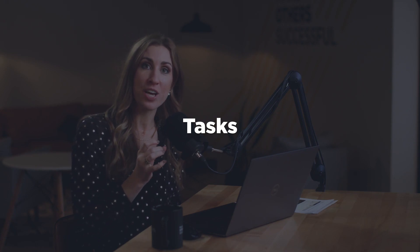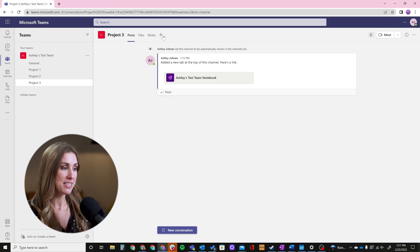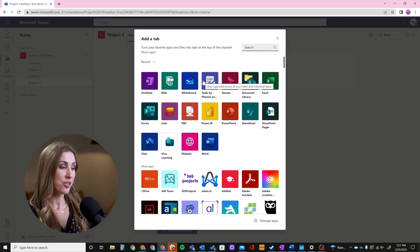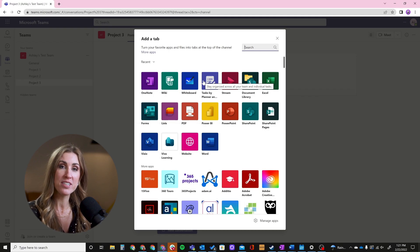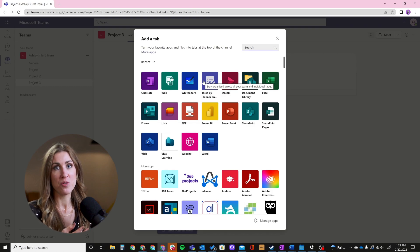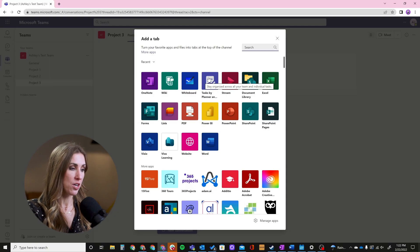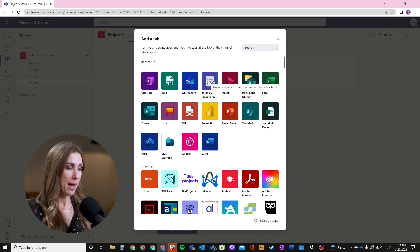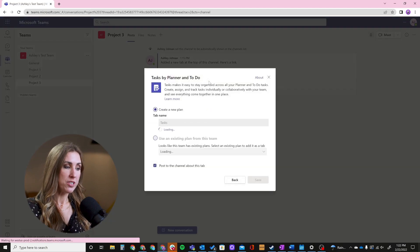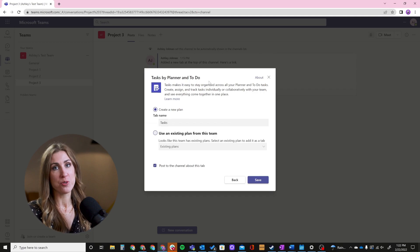The other tab I always make sure to add is for task management. Whichever tool you're using to assign and track tasks in your projects, make sure it's added — that's really the best practice for project management in Microsoft Teams. Teams integrates with a lot of different project management tools. You have Microsoft ones like Project and Planner, but there are also third-party options like monday.com or Trello. If those work best for your project you can add them as a tab and still get the benefit of having a central source of truth. I'm going to use Planner — that's called Tasks by Planner and To Do — and the benefit of using a Microsoft tool is that it's going to inherit the permissions you've already created for your team.